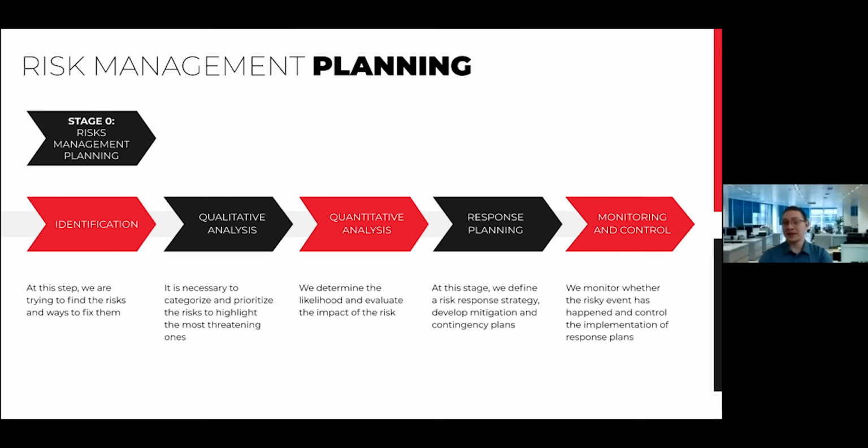When all of the analysis and planning is done, we have to monitor the occurring of risk and its trigger, monitor the execution of response plans, and, if needed, redo the analysis and planning.